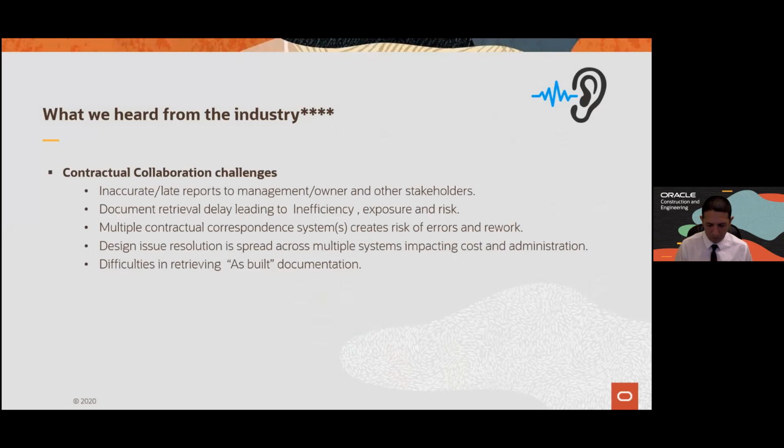One is, for instance, in the early stages of the design, how would you know we've now got 50% of the design work done? If you go into your document register to see how many documents are for review, out of the 49,000 documents a project of this size produces, how can you quickly show that 60% of our documents have been reviewed, 40% have been approved, and let's say 10% have already been shared for construction? So we want to improve our accuracy in reporting.